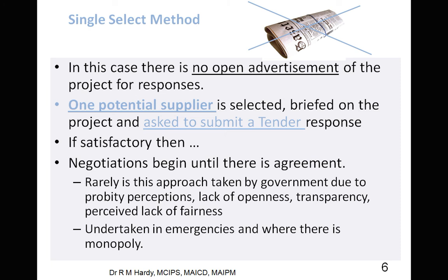Generally clients do not want to get quantity surveyors involved because of the cost. If you've got a larger project and you can afford $3,000 to pay a quantity surveyor, then that's money well spent in the context of a project that may be $1.5–2 million.